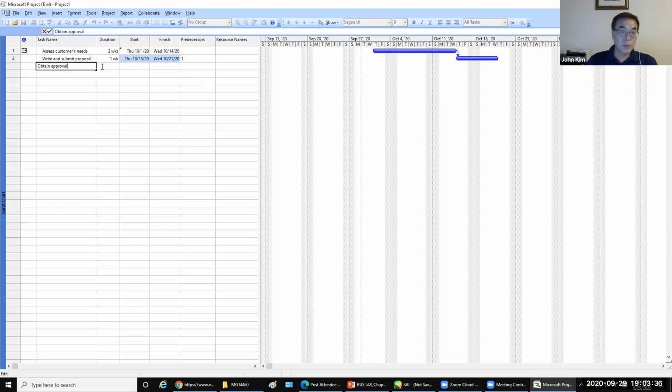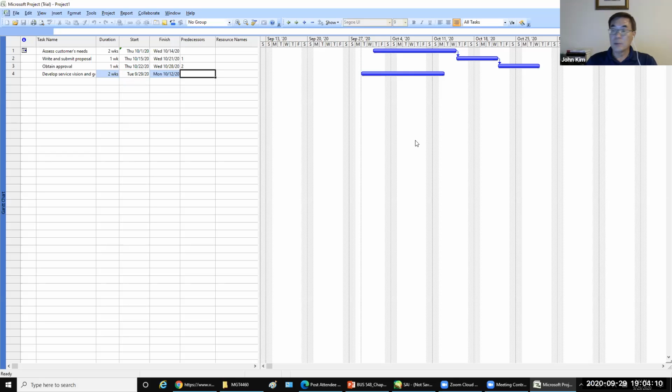It takes 1 week. Predecessor is B, so 2. The fourth one takes 2 weeks, and predecessor is 3.